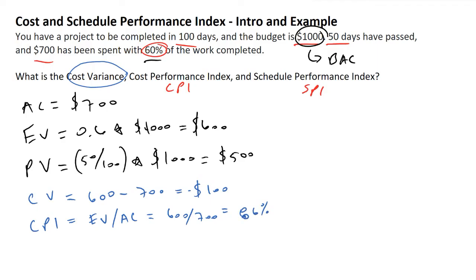So what that's telling us in decimal format is 0.86. Because this is less than 1, this means that the money is not being spent as effectively as what we've been budgeted for. So for each dollar that we're supposed to be getting out of a project, we're getting slightly less than that.